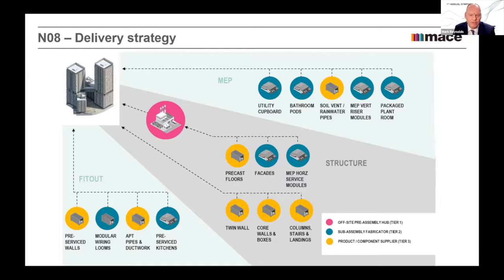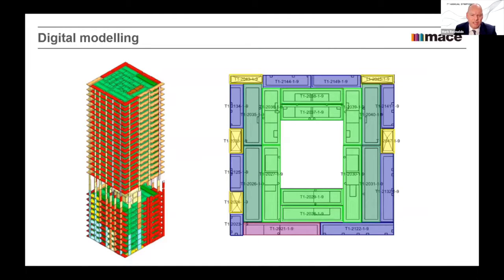And we use Autodesk Field and Glue to look at the installation on site, draw up our punch list and our life cycle testing. Key to what we do is creating this federated model, which is really important. And the federated model gives us our ability to chunk the floor plate up into a number of components, very simply structural modules. And these modules are made off site, delivered to site.